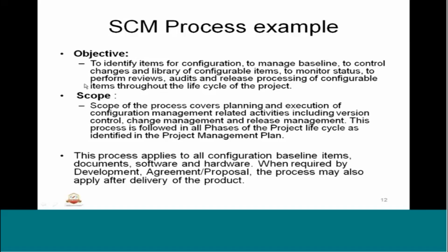And the scope of the SCM process covers the planning and execution of configuration management related activities, including version control, change management and release management. This process is followed in all the phases of the project life cycle as identified in the project management plan or the project plan. This process applies to all configuration baseline items, documents, software and hardware. When required by development, agreement, or proposal, the process may also apply after delivery of the product. You need to have this process.